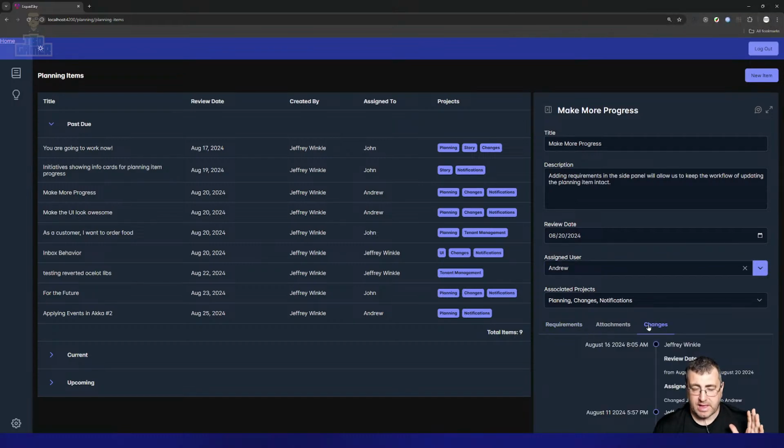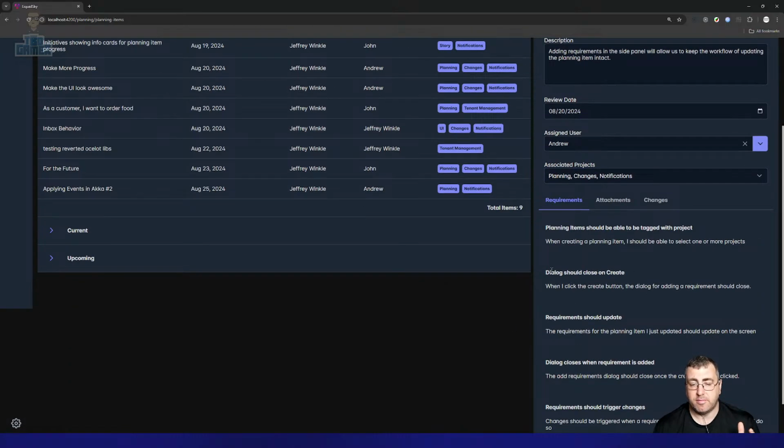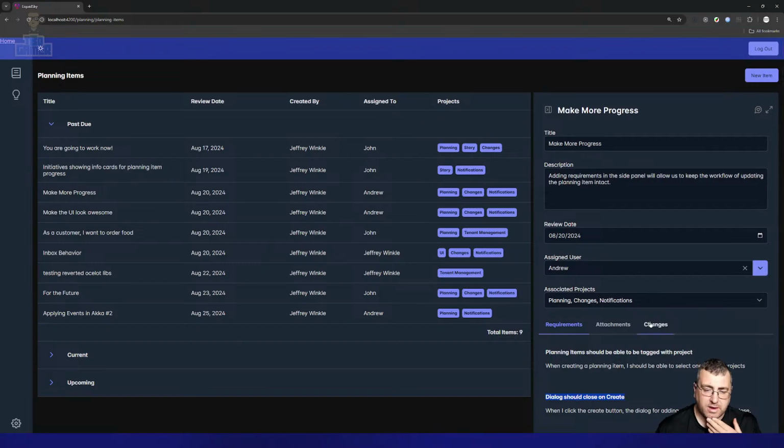So if you have a DevOps team that has to do deployments and stuff, there might be a requirement in here that requires us to be able to see it. Well, we say that needs to create a story for team A to do the actual visual part, but team B needs to configure the servers. So this requirement can create two stories, and each team is assigned that work, but they might be under the same project, right? They might not be.